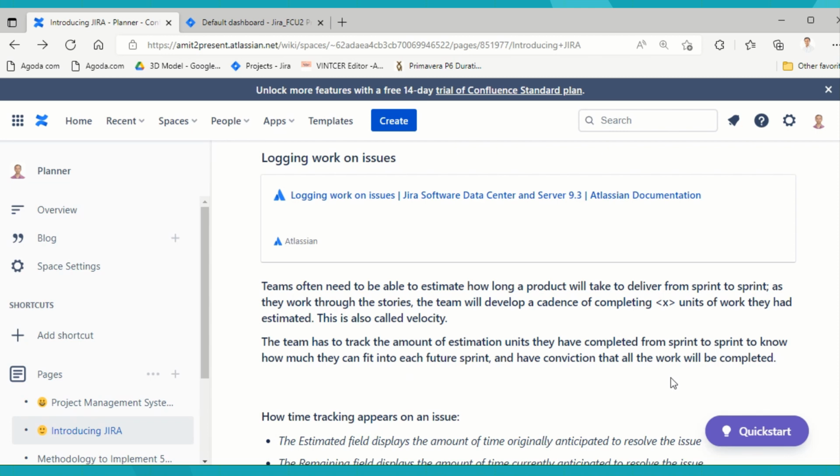Now this is one more good thing. Suppose we have some repeated sort of jobs, in which we know that after this particular sprint we have a future sprint that is going to have similar activities and a similar output. What we do is look at the velocity of that sprint, and see that this is the velocity we have achieved as of now. So in the future this is also going to happen, and the completion date will be this.